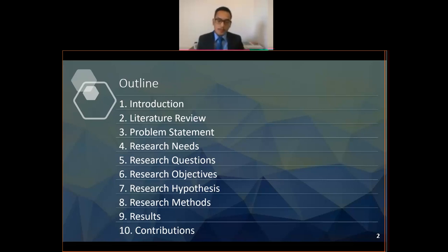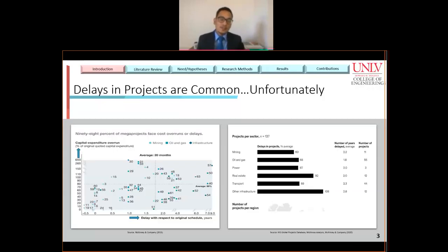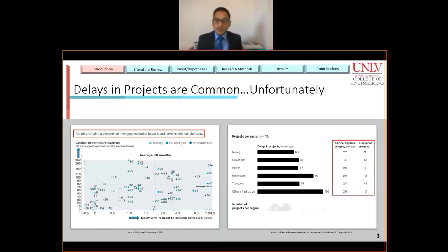So let me start by saying something that is very common knowledge to us all. Delays in projects are common, which is very unfortunate. 98% of projects incur cost overruns or delays, according to a McKinsey study. The average cost increase is around 80% of the original value, whereas the average slippage in schedule is 20 months behind schedule. Project costs continue to climb, and this has started to impact the economic viability of projects.